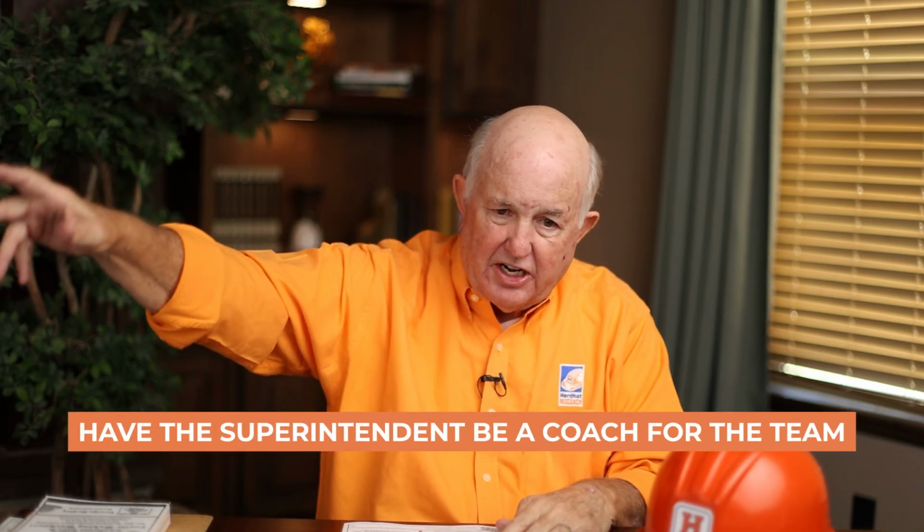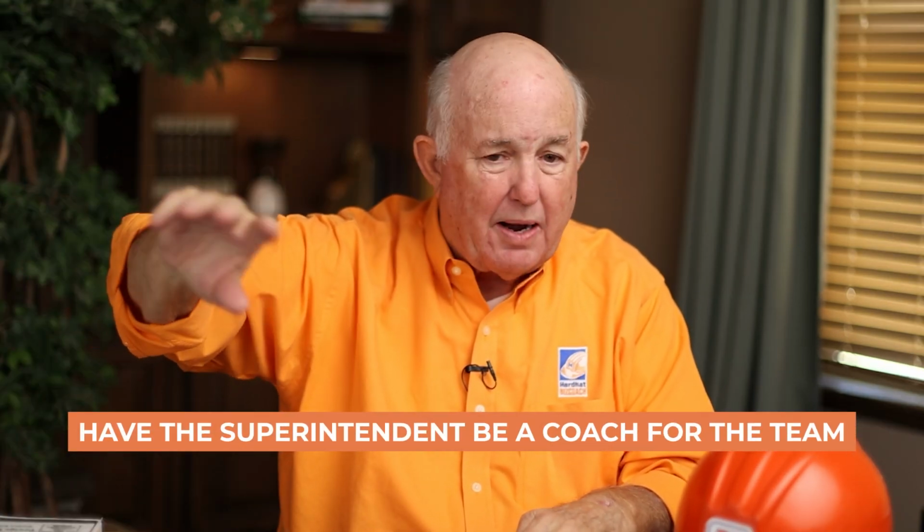That's okay, but the project manager gets left out of the loop talking to the supervisor, going over the budget with the supervisor, going over the schedule with the supervisor, because there's a third party in the middle who's not really in tune with the contract, the documents, the scope. They're just overseeing somebody. So it's kind of a mixed who works for who and who reports to who. So I like to have the general supervisor, superintendent, field operations director, manager, as I said earlier, be a coach or a mentor or sort of a consultant to the team.